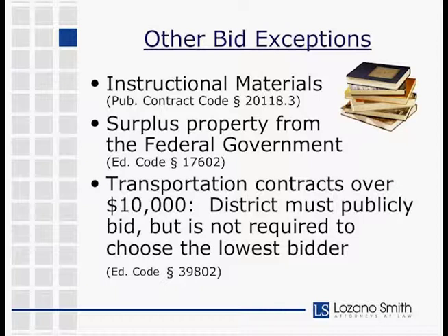And certainly, the other risk to mention is that since there's no bidding requirement, there could be a risk that the district enters into a contract and ends up overpaying for the construction project by quite a bit of money. And then, like I said earlier, that can be decreased if the district goes through at least some sort of competitive process, like an RFP process, for example. That can be very helpful to decreasing some of these risks.